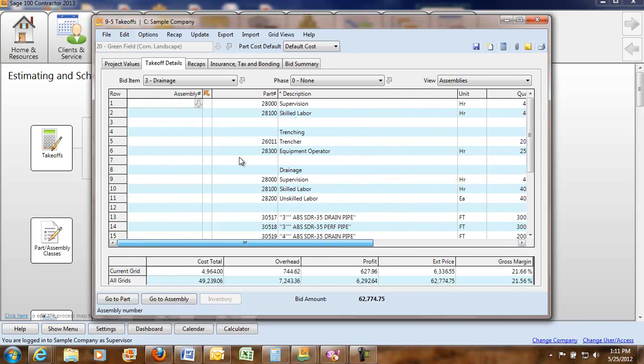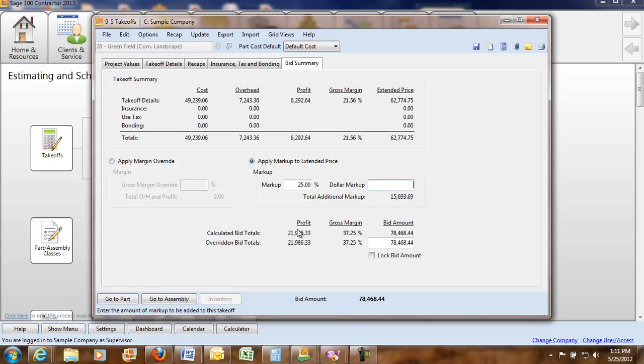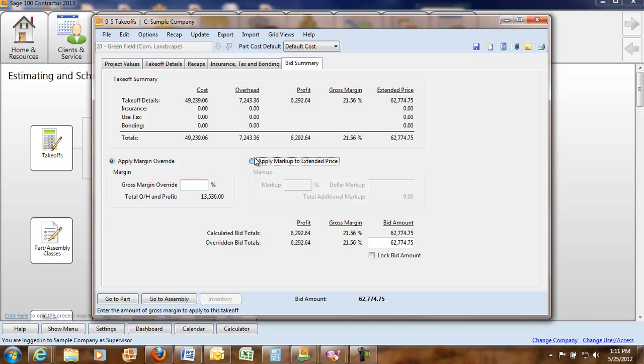Within this portion of the module you can look at your bid summary and you can make changes to the markup. You can say I want to have a 25% markup and it's going to add everything to the total or you can say I want to do a margin override if you want or just a basic dollar markup.